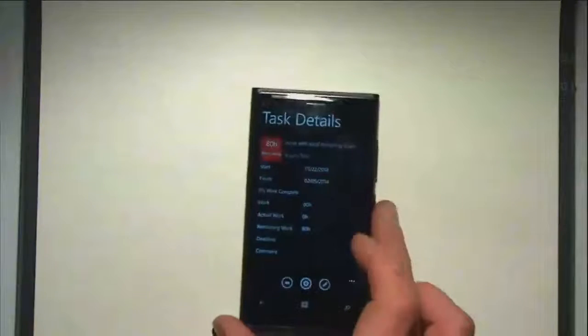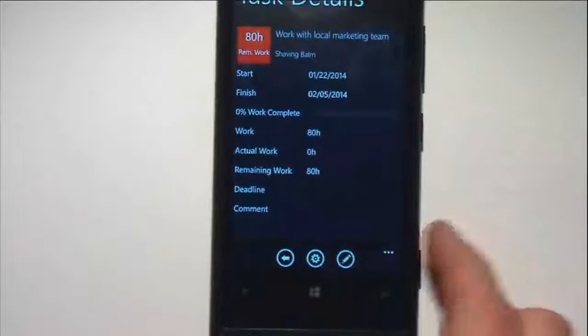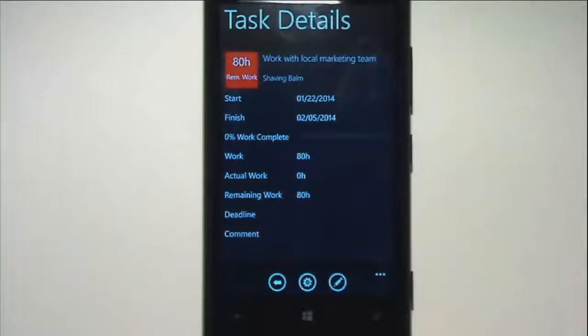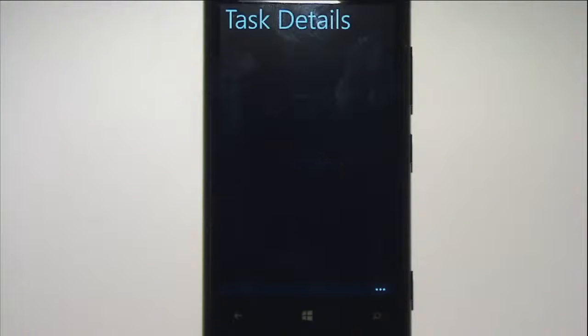Okay, so that's that done. Here's Frank. So I've opened up one of these tasks for Frank. Before, in the SharePoint list, I said it was done. Here we can come in and edit that. Is that what we tried to do before and it went belly up? Okay, I should have just left it where it was. Let's see if second time lucky it works. I'm going to put in actual, remaining, change the start time, send update, and away it goes. So that was the idea.